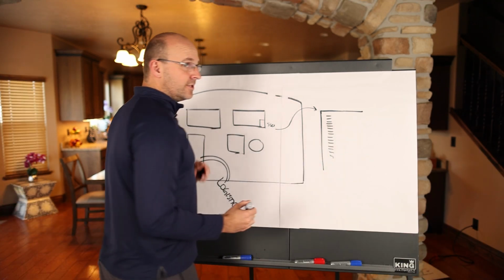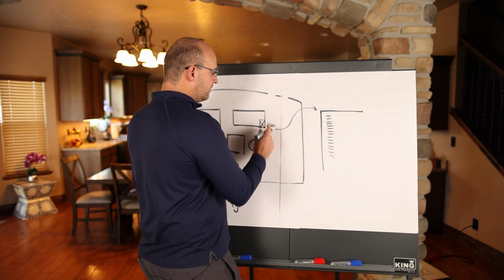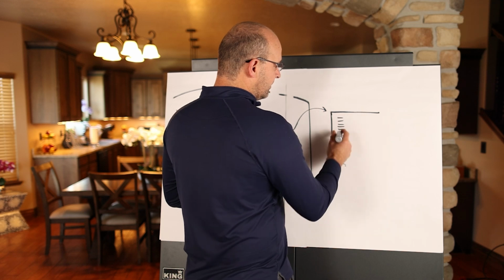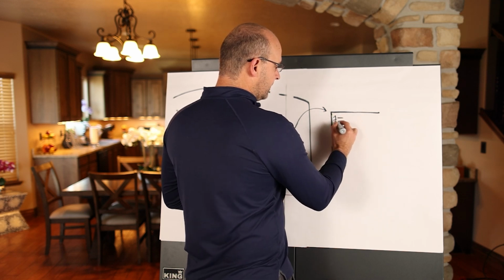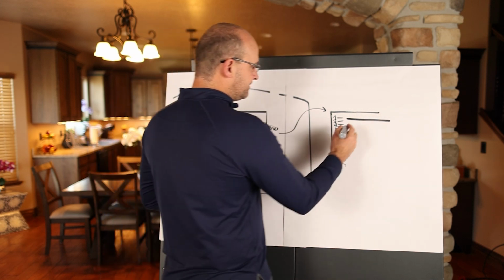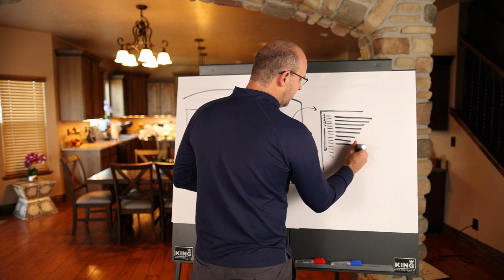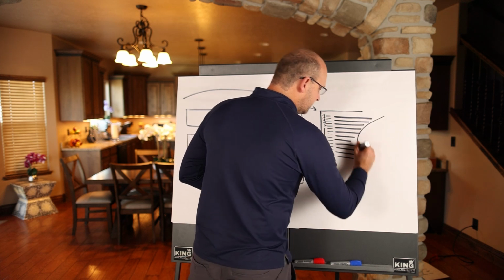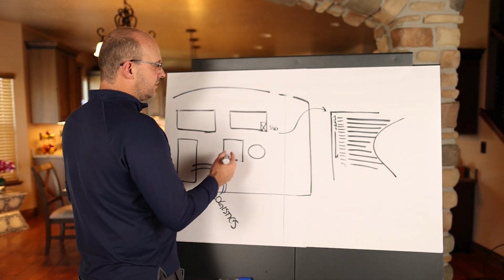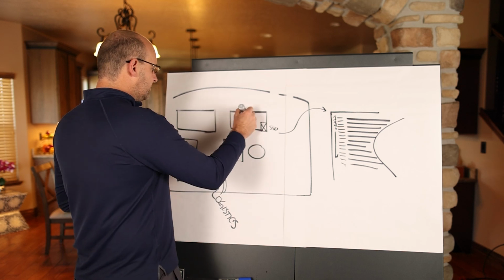You can identify the zoning of your project, and what will happen is it will tell you, according to your minimum standard space unit for your multifamily project, depending on the different numbers of zones. Let's say this is 1, 2, 3, 4, 5, you get all the way down, right? It will tell you, at least per building or per phase, what the different zoning strategy will do to your project in duration. And what people don't know is that there's a massive curve with that.